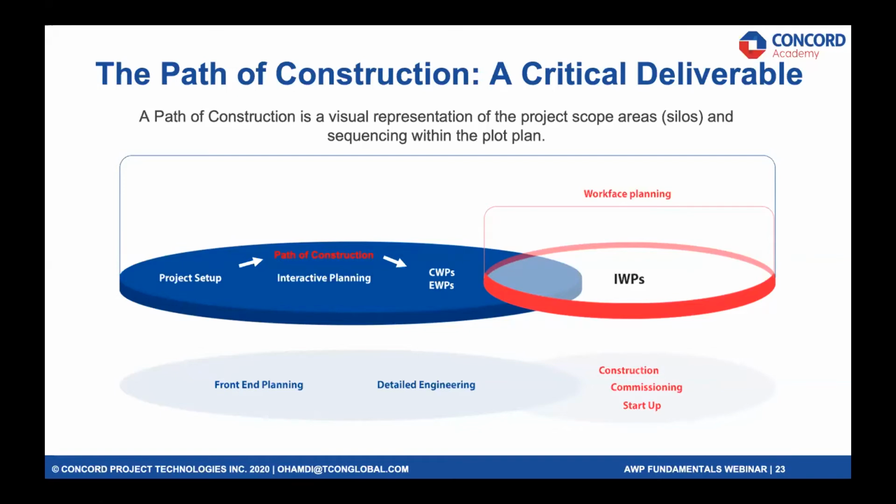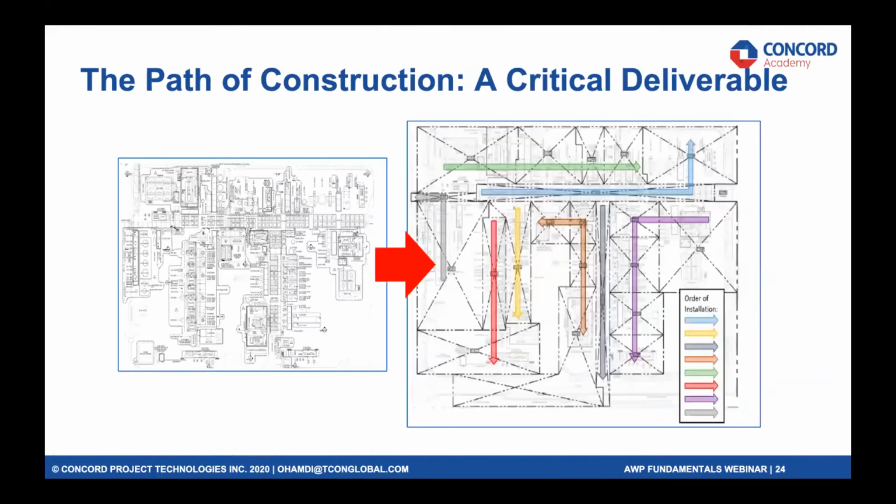Now, if you are a discipline contractor or an EPC contractor and you got on board after the FEED package was complete, is it late? Well, it's not late as long as you have not started detailed engineering. So it's a good opportunity to align the EPC work with the FEED work, the definition work, or the early work in that award stage or prior to award. In the bidding stage, that's a good opportunity to come up with a path of construction. Although it's late, it may take a lot of time, but it is worth doing. It's just an investment.